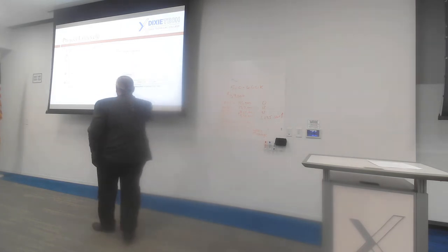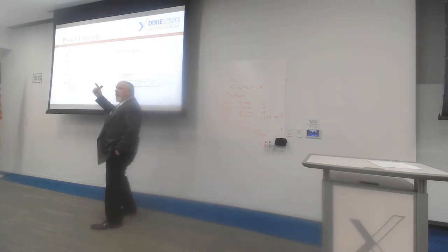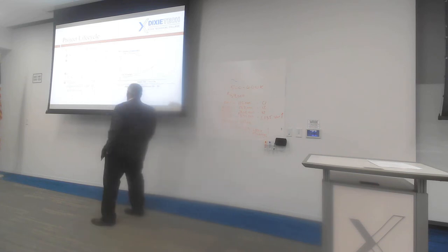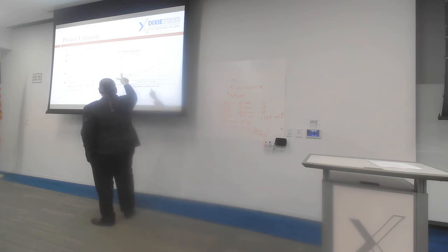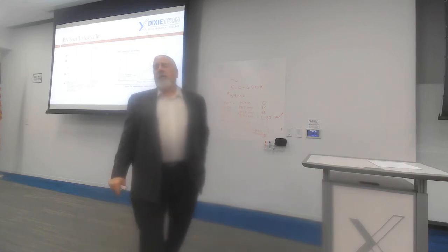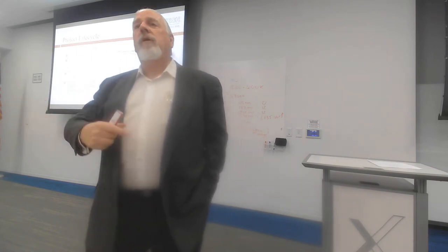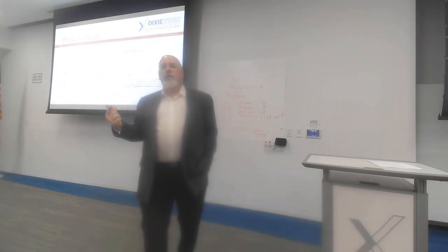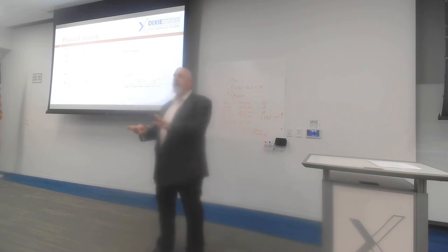Also, they're the ones that can expand the project more easily before we've broken ground or before we've launched all the effort. And so we pay a lot of attention to them. We have to throughout, but understand that their influence gets less and less as the project moves on. They've already paid their money. We've already got their money. We've already got their commitment. They are in too far to pull out. And so the influence, whether they like it or not, their influence weakens as the project moves on.